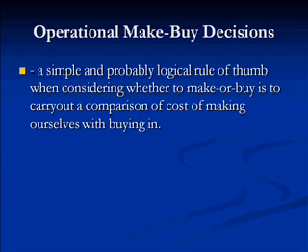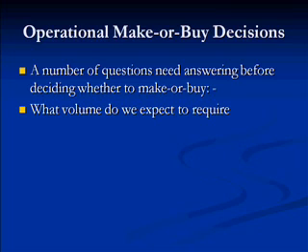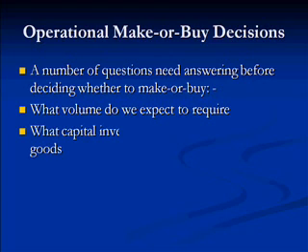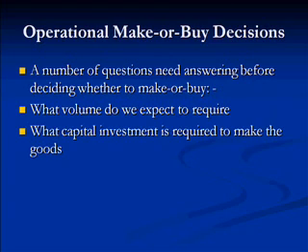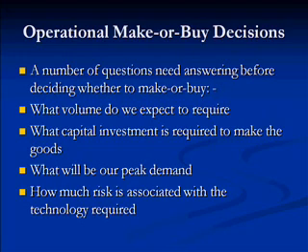Operational make-buy decisions. A simple and probably logical rule of thumb when considering whether to make or buy is to carry out a comparison of the cost of making ourselves with buying in. A number of questions need answering before deciding whether to make or buy. What volume do we expect to require? What capital investment is required to make the goods? What will be our peak demand? How much risk is associated with the technology required?